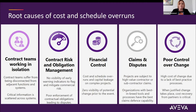Contracting today is still done with Excel, email, Word, maybe some SharePoint or a project drive — all this data spread across many tools. Your contract risk and obligations are also at risk: any obligation on your contract could be a deliverable or something that's due, and any missed obligation opens up one of the parties to a potential claim. We want early warning indicators so nothing falls through the cracks.